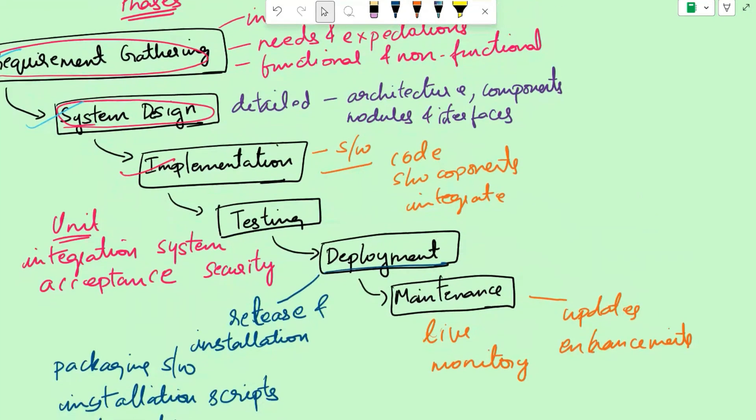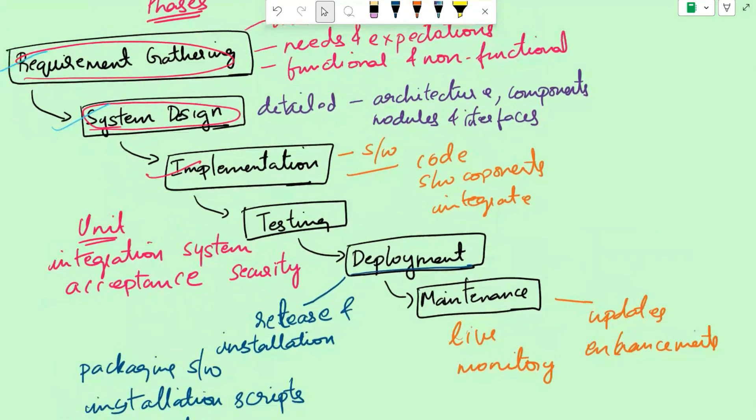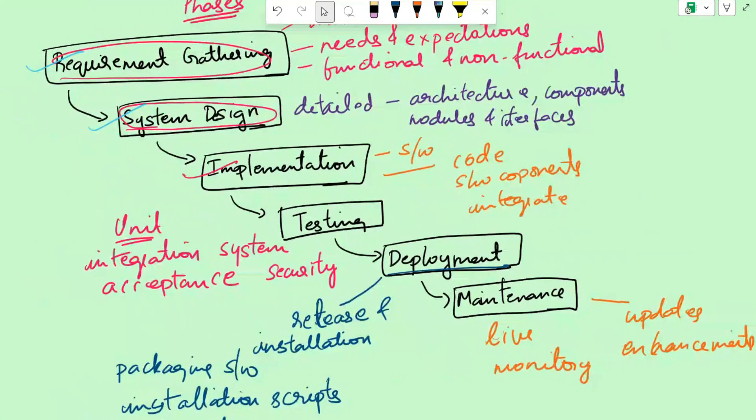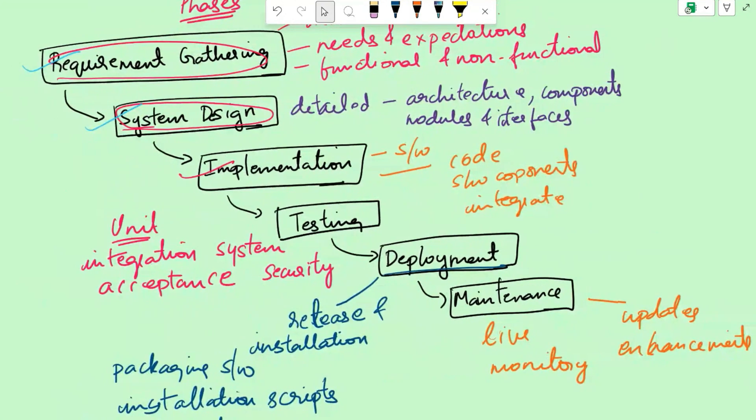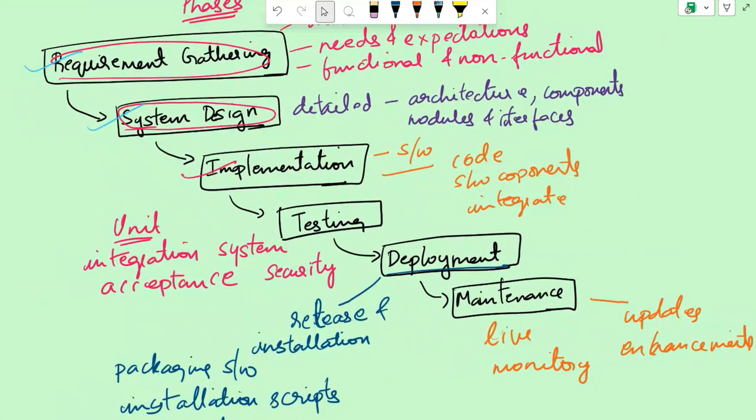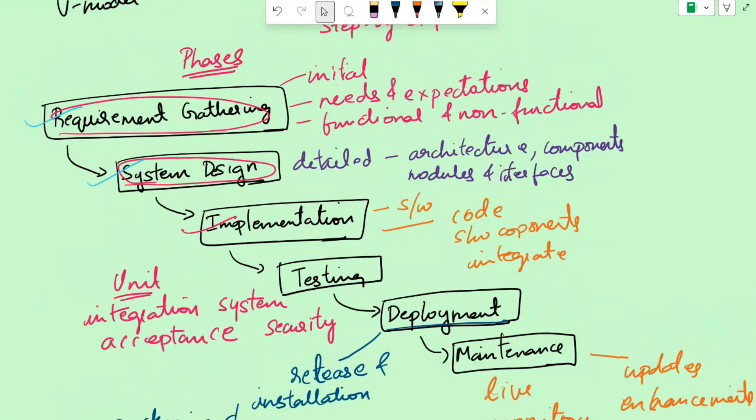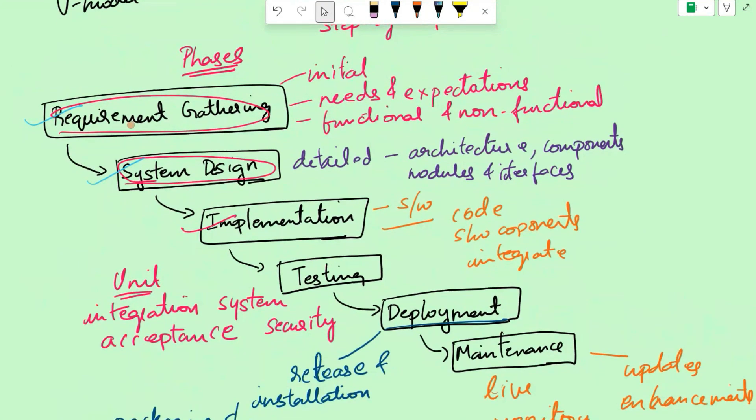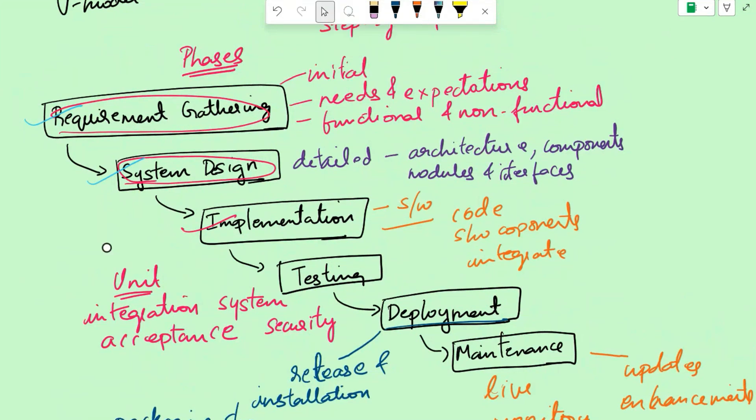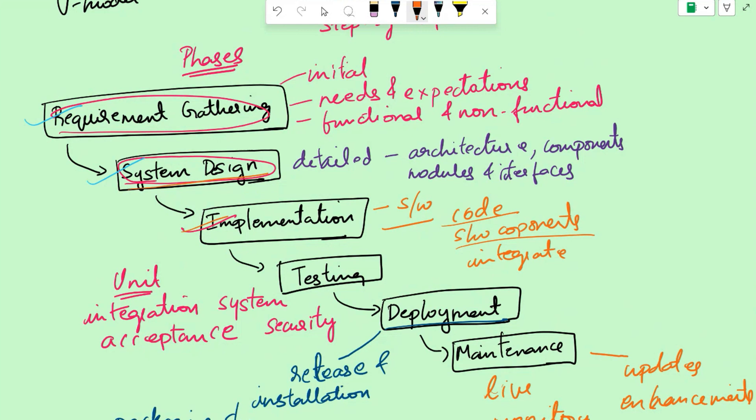So these are the six phases. Typically, these are the six phases in waterfall. First is you gather the requirement in the requirement gathering phase. Then you have the system design where you draw the diagram. You know what is the detailed architecture, components, modules, and interfaces that are required. Then we have implementation where you write the code, find out what are the software components that are required, how to integrate all of them together, and configure them. Once the software itself is ready, you test it.